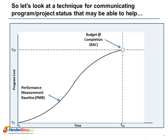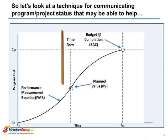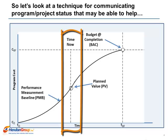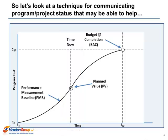Throughout the planned duration of the program, the program has a status. The status at any point in time — time now — has a budgeted value. This budgeted value is known as the planned value: the cumulative value of the budgeted work at time now.